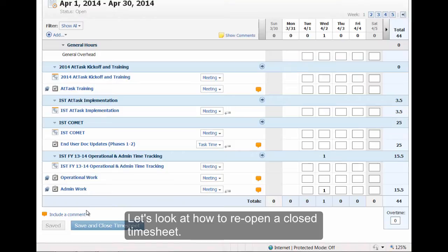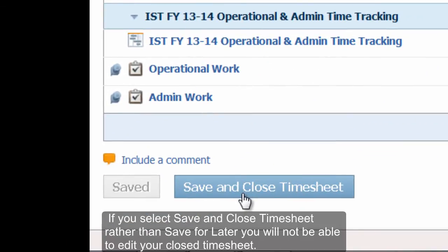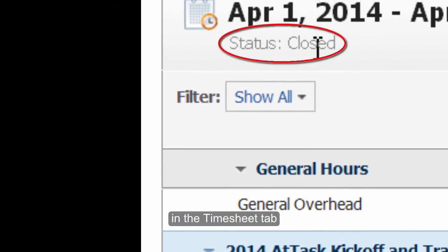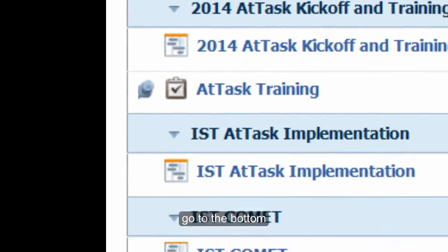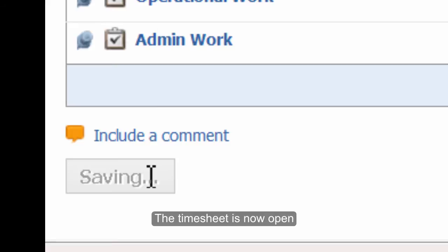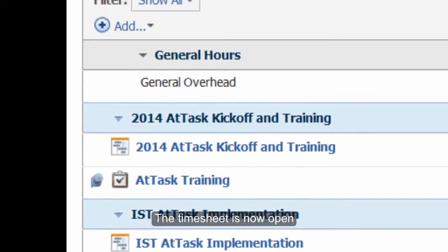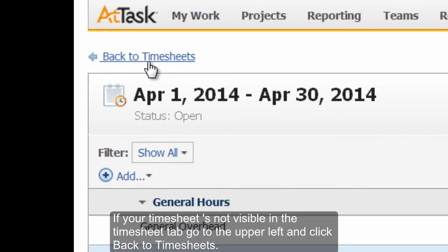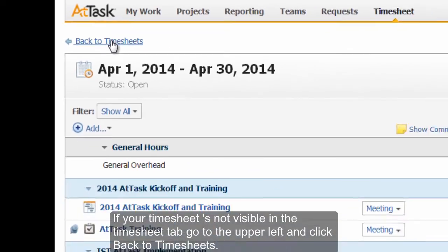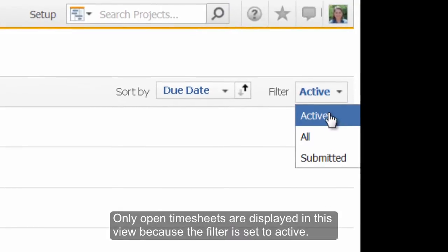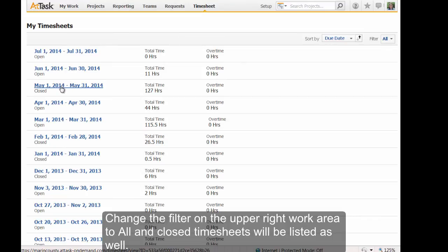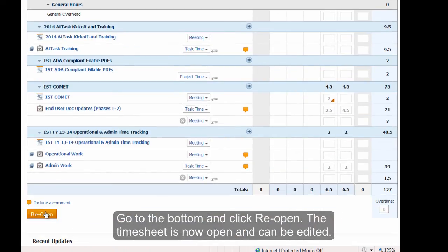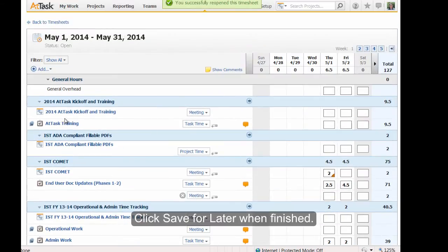Let's look at how to reopen a closed timesheet. If you select Save and close timesheet rather than Save for later, you will not be able to edit your closed timesheet. If the closed timesheet is showing in the Timesheet tab, go to the bottom and click Reopen — the timesheet is now open and can be edited. If your timesheet is not visible in the Timesheet tab, go to the upper left and click Back to Timesheets. Only open timesheets are displayed because the filter is set to active. Change the filter to All and closed timesheets will be listed as well. Click on the closed timesheet you wish to open, go to the bottom and click Reopen. Click Save for later when finished.